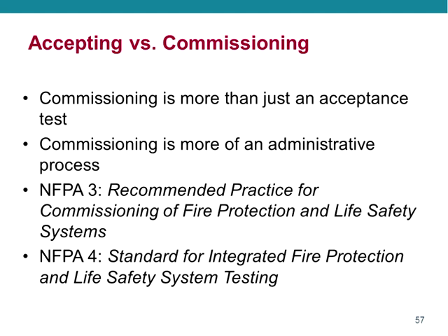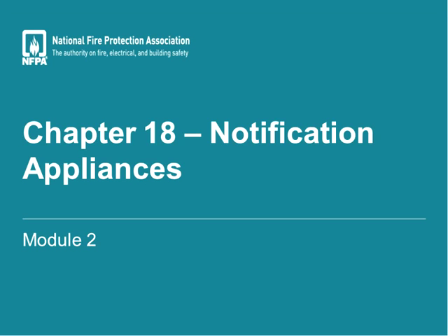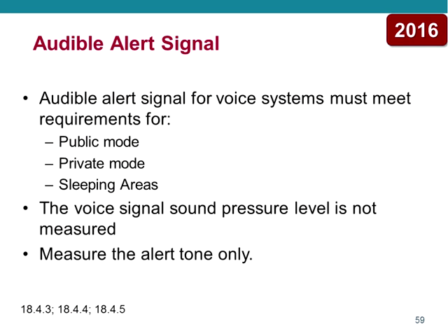It takes typically anywhere from a few months to several years, depending on the size and scope of the project. So make sure that we use those terms properly, and that we don't refer to commissioning as what we really mean by a final acceptance test. And those are the basic changes to Chapter 17.